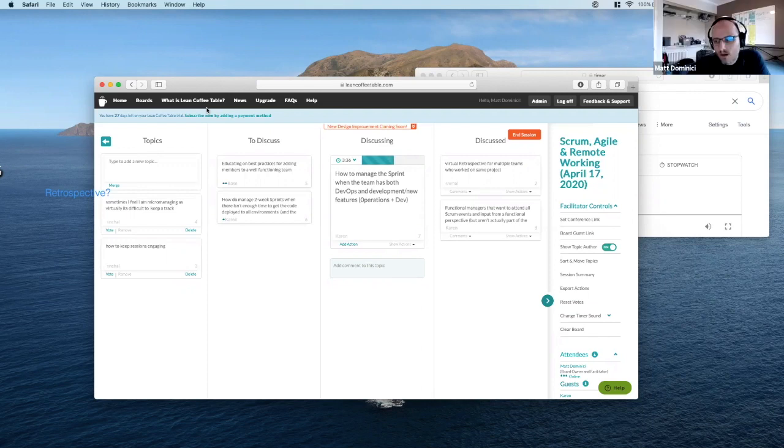When you were doing that, how did you come up with the ratio of how much capacity we set aside for those kinds of things? We looked at the data, went back a few sprints, and looked at how much time on average we spent. So we came up with 8 story points worth of time, on average. That's great, using data to inform our forward plans. That's what it's all about.